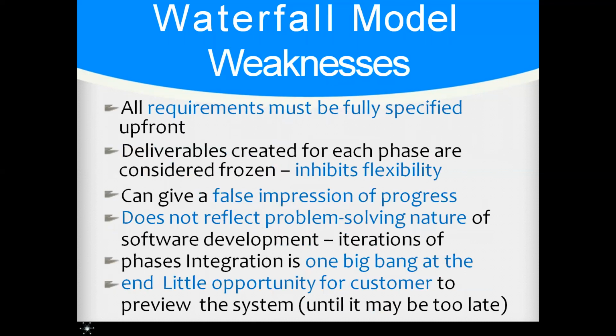The weaknesses, it has its own weakness. There's nothing with a merit without a demerit. All requirements must be fully specified upfront. If requirements in the waterfall model are not fully specified, it will be difficult to go back when you have started designing. Are we together? We are together. So it does not have a place whereby you can always reanalyze at each stage or redesign at each stage. It has to follow that sequence. So you must have proper analysis.